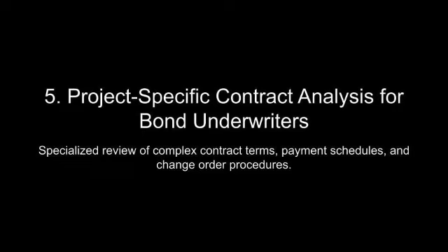Historically, payment terms have evolved from simple lump sum payments to complex milestone-based structures designed to align compensation with measurable project progress. The shift toward milestone payments, while ostensibly reducing risk by tying disbursements to completed work, has introduced its own set of challenges, particularly when terms are ambiguous or inadequately vetted.